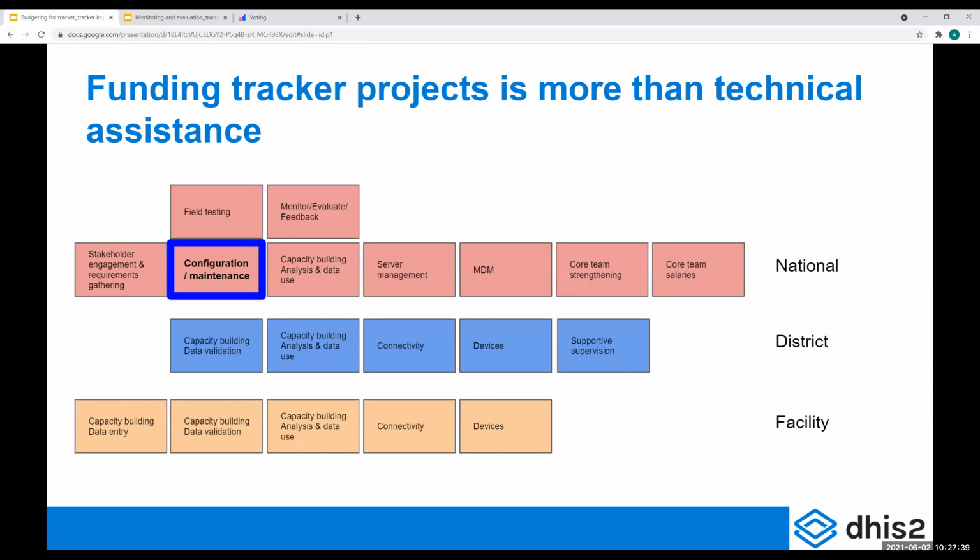Available funds to do IT in healthcare are a limited amount of money, and it's a shame to waste a big introductory pot of money if you know that it's not going to be sustainable, if you know that there's no money available to pay for connectivity or to replace devices in 2 years' time. Should you really make a huge upfront investment on configuring, gathering stakeholders, etc.? Then you could spend that money on something else.